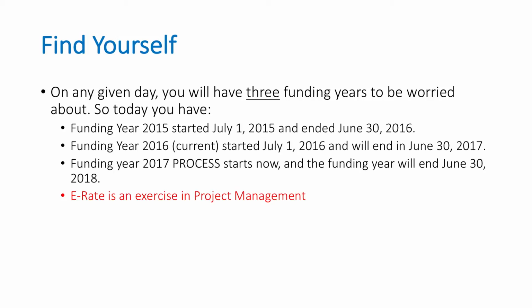We're currently in funding year 2016, so those are the services and invoices you're currently managing, and then now we're looking at the open windows to plan for funding year 2017. So as the slide says, E-rate is an exercise in project management because you have to look at a scope of 3 different funding years at any given time.